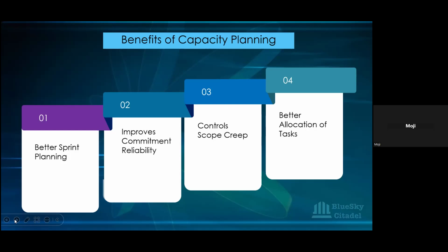So when you're planning work commitment for that person, don't plan 10 days of work, because you know that they might not come 10 days. They have a pattern of always taking 2 days off or a day off. So you're planning work for them based on that. It improves your team members' commitment, and it also improves the reliability you put on someone. Their tech lead, if they have one, will be able to look at that and know the pattern of this person.